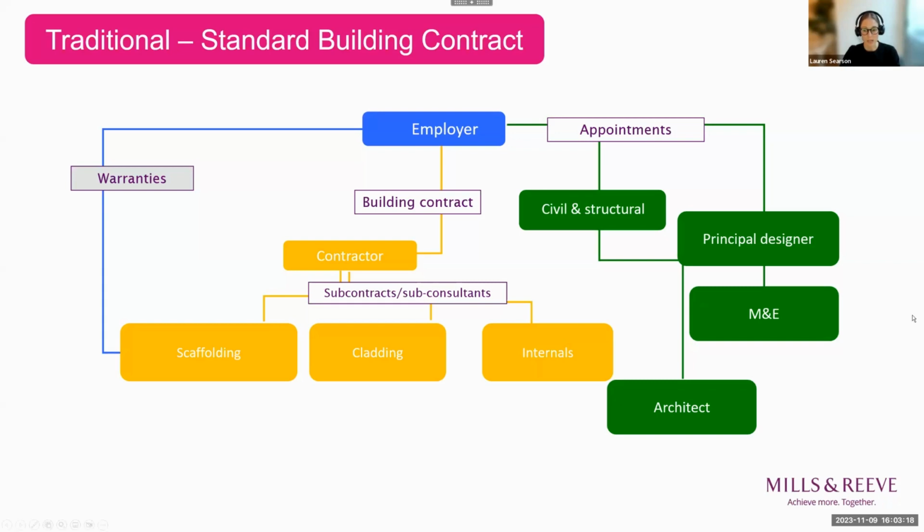There are two families of standard form contracts which exist here in the UK and are generally used by the commercial development community: the New Engineering Contract, or otherwise what we would call the NEC, and the Joint Contracts Tribunal, known as JCT. Government has suggested the use of NEC contracts rather than JCT in the public sector, such as education, health, and local authorities. I guess one of the first questions which need to be answered before the type of contract is selected is, how does the employer wish the construction team to operate, and where will the balance of risk versus control fall?